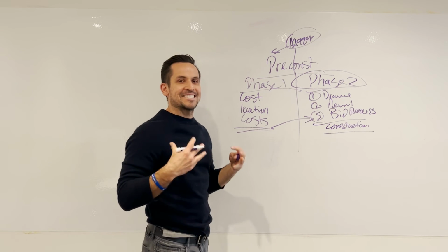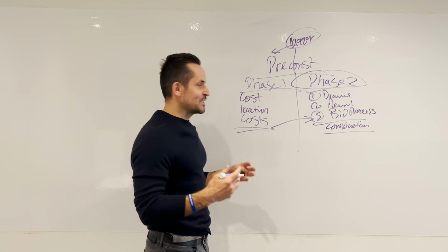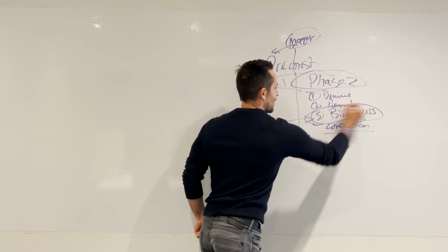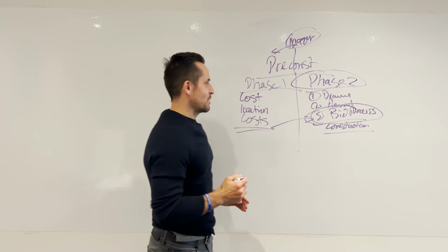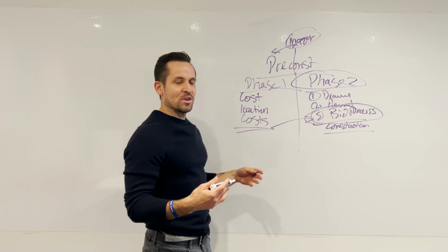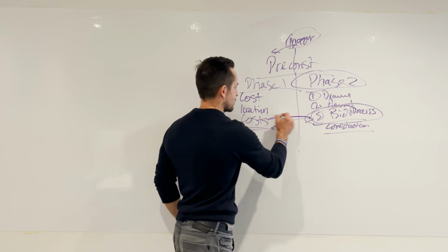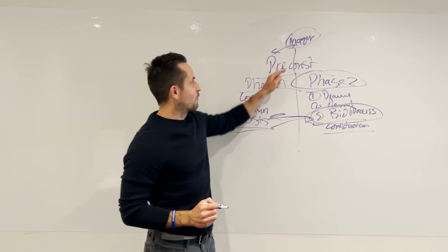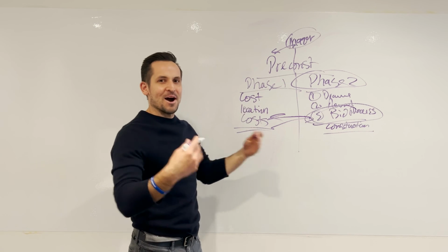Construction makes up over 65% of the entire project, and it's the least known until you get to the bid process phase, and actually might be too late. You might be 100, 150, 200,000 plus over what you've estimated your project to cost. So understand what your costs are in phase 1 before triggering and signing a lease, because you can't really go backwards once you've made that commitment.